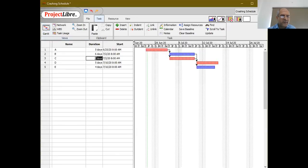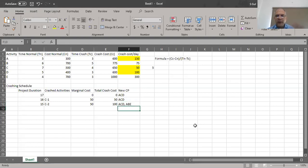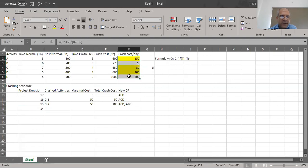With all activities on the critical path, we now have two critical paths: A-C-D and A-B-E. C is currently at five days. To reduce from 15 to 14 days, we face a dilemma — crashing only one path won't reduce the overall project duration. We must address both paths simultaneously.